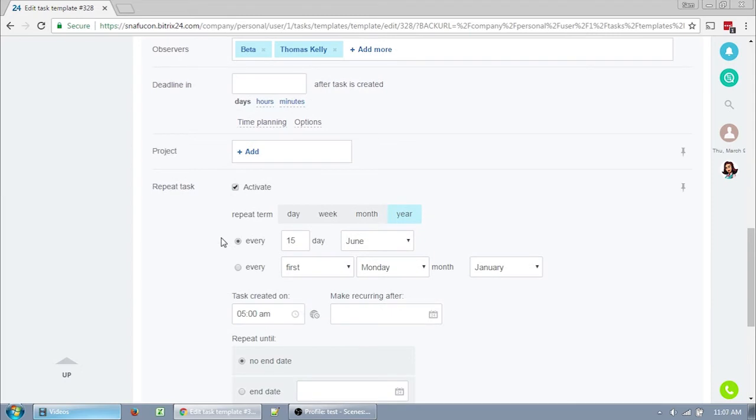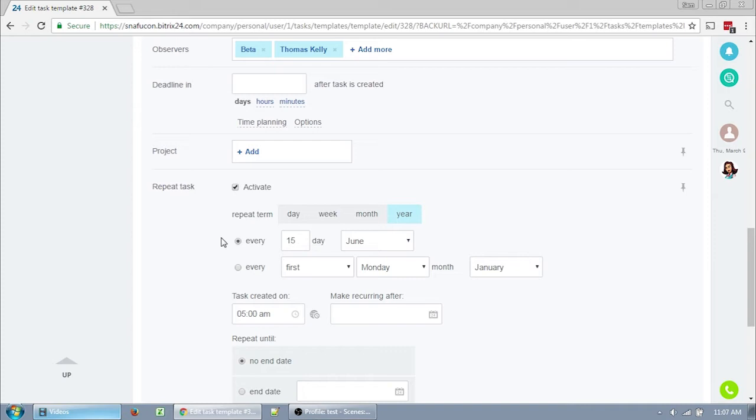So deadline in is how many days after the creation of the task that the task will be due. What this does is when the template generates a task, it will automatically set a due date for you based on the day it generated the task itself, whether it was automatically generated by the system or manually generated by you. You can set this as a rather high number if the task is generating early in the year and you want that task around for a while, or you can set it to a few days if it's more urgent. You can also leave it blank, but I strongly recommend setting a rough due date.